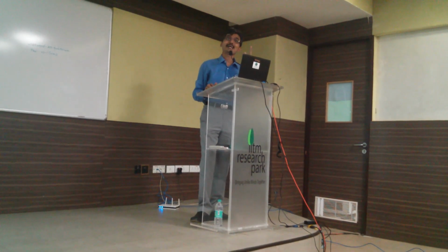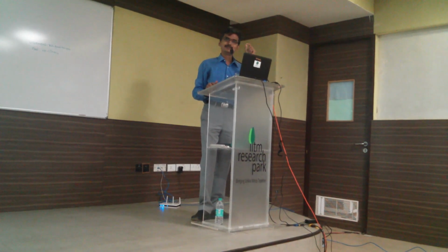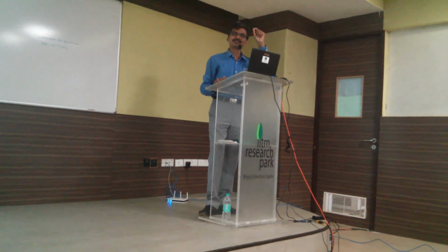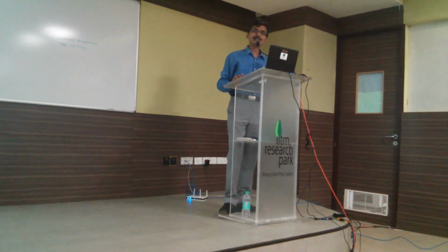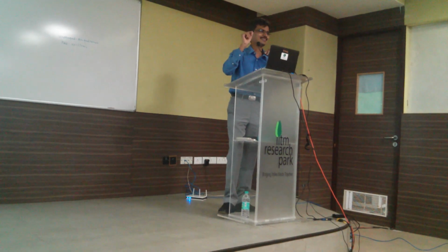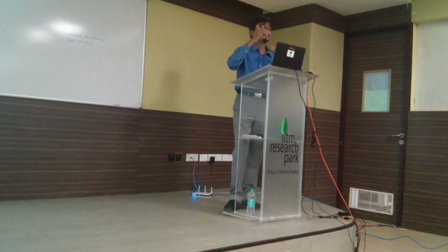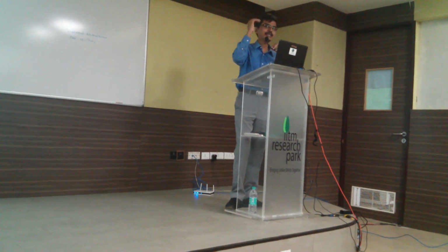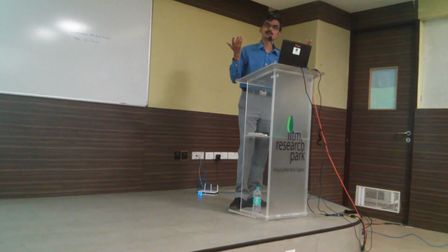But the project is having 11 baselines. Of the 11, remember, the one that is without number is your latest baseline. Baseline 1 to baseline 10, which we'll see next, is only for your reference purpose, backups. But people who may not have this knowledge think the first baseline is baseline 1, the second baseline 2. After 10 baselines, they don't know what to do.